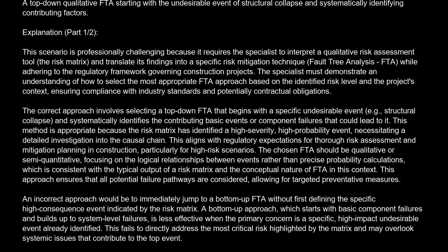The chosen FTA should be qualitative or semi-quantitative, focusing on the logical relationships between events rather than precise probability calculations, which is consistent with the typical output of a risk matrix and the conceptual nature of FTA in this context. This approach ensures that all potential failure pathways are considered, allowing for targeted preventative measures.